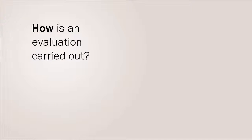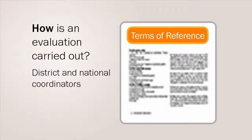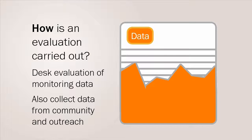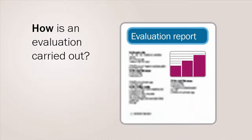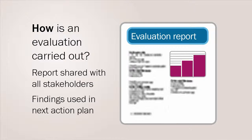How is an evaluation carried out? Terms of reference, or the scope, are agreed between the district and national coordinators and the external evaluators. Data from all monitoring activities is made available to the evaluators, who carry out what is known as a desk evaluation. The evaluator will also collect data from community and outreach if needed. A report is then compiled and shared with all the stakeholders, and the next action plan takes the report's recommendations on board.